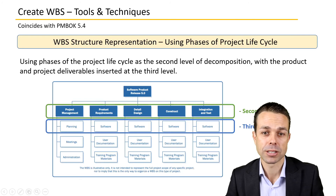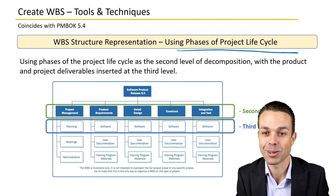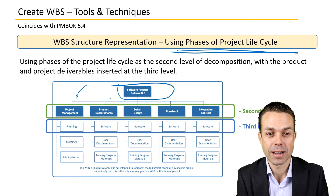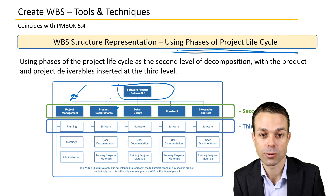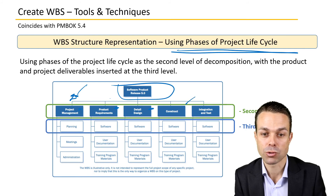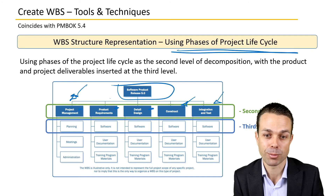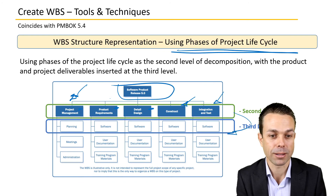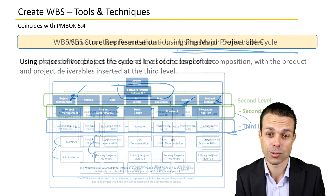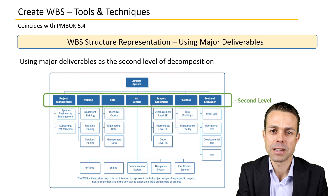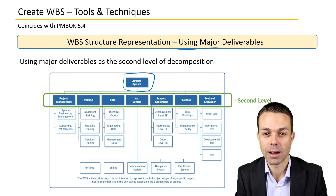You might also use phases of the project life cycle to break down the WBS. Here's an example with one project broken into different phases: project management, products, requirements, detailed design, constructing, integrating, and testing. Over those different phases we break down what's being delivered — planning meetings, administration, software, user documentation, training program materials, and so on. Another way is using major deliverables, breaking each down into levels — level two, level three, level four — with work packages for each.